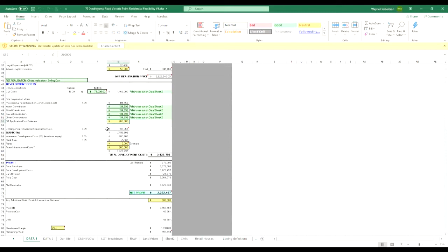We've had some preliminary discussions with council and got an indication that we'd be able to build the 19 allotments based on the rough plan that we've got. And then we put in 5% for contingencies. We've got interest development on the costs of doing the development, because we've got to fund this development. And we've got the bank fees, and we've got our standard rates. And there's an interesting one with this one, which is a bit of an additional cost that's a little bit unusual.